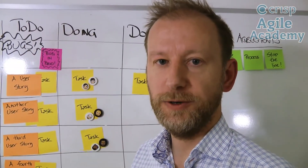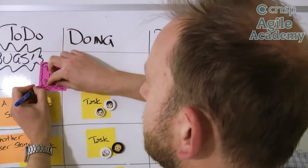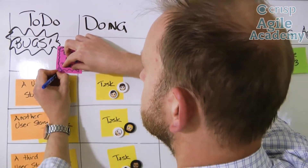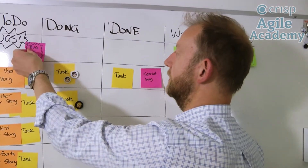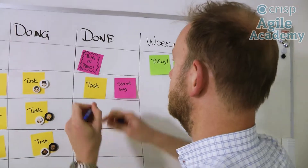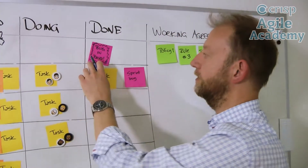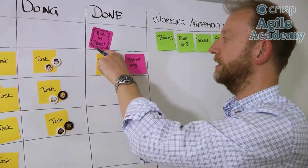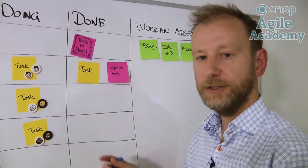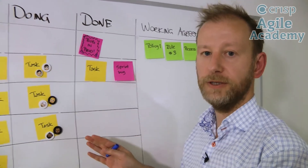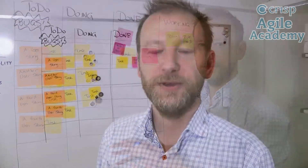A good practice is to note the date when the bug occurred — just write the start date when it came to your board. And then when it's done, note the end date. So if it started on the 15th and ended on the 16th, you have one day lead time. Measure this lead time on your bugs in production at least, because minimizing this lead time will save you a lot of money.